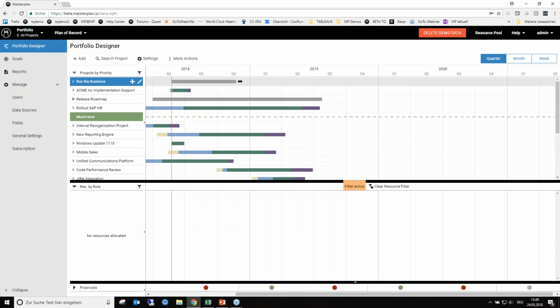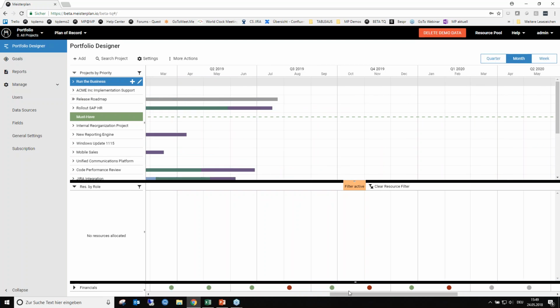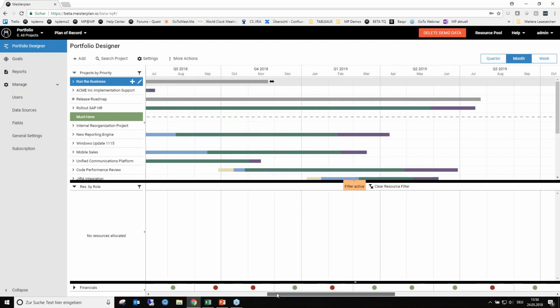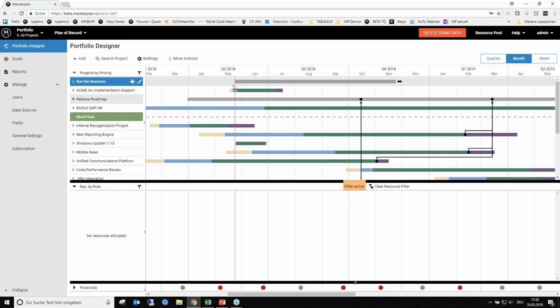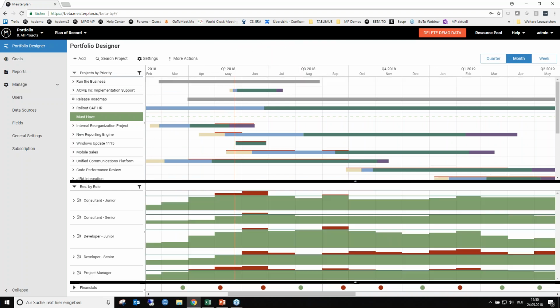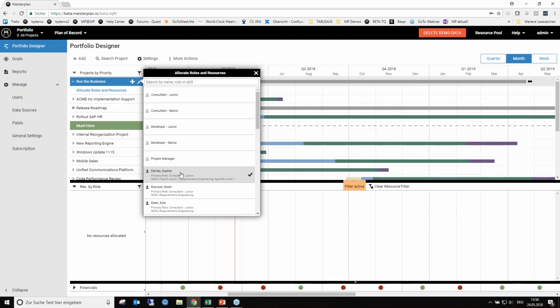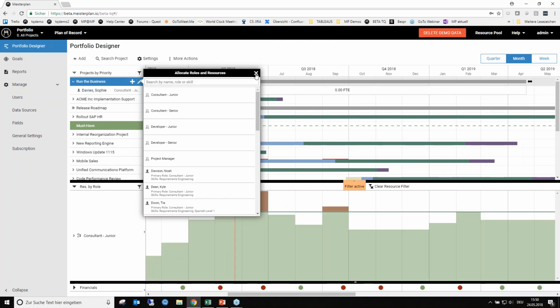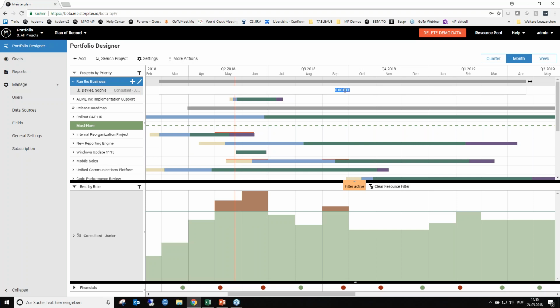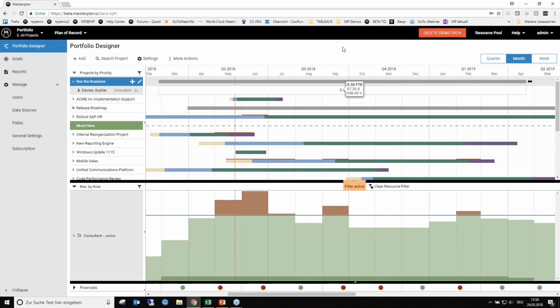Then we would give this project a start and end date for the whole year. So basically, this is really to cover the daily business, and we would then book the IT personnel on that and plan with 0.3 FTE. That would resemble 30% of their capacity.